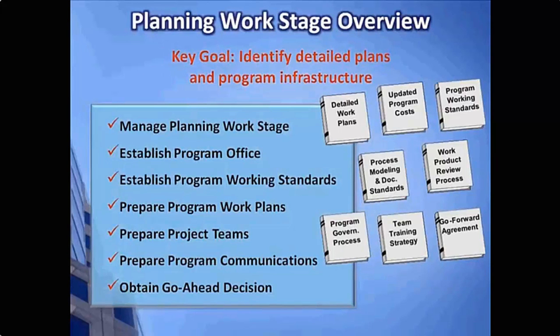Here's our planning work stage overview. Again, the goal of this work stage is to identify the detailed plans and program infrastructure. This represents the key tasks and outputs for planning activities. In this work stage, your IT Service Management Program Office is formalized, program responsibilities are identified and assigned, and work plans are detailed and finalized for moving forward with your initial win efforts and also your design work stage. Actually, both of those stages will happen in tandem as you get started.